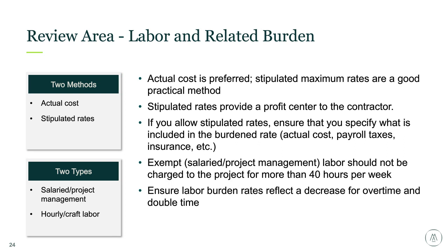Whichever route you go, it carries a different risk profile. For example, if the rates are negotiated, are they market competitive? Is there an opportunity for the contractor to overcharge the job with labor rates to lock in additional fees? So if there's fee in the rates, if they overcharge the job with labor costs, they're getting more fee.